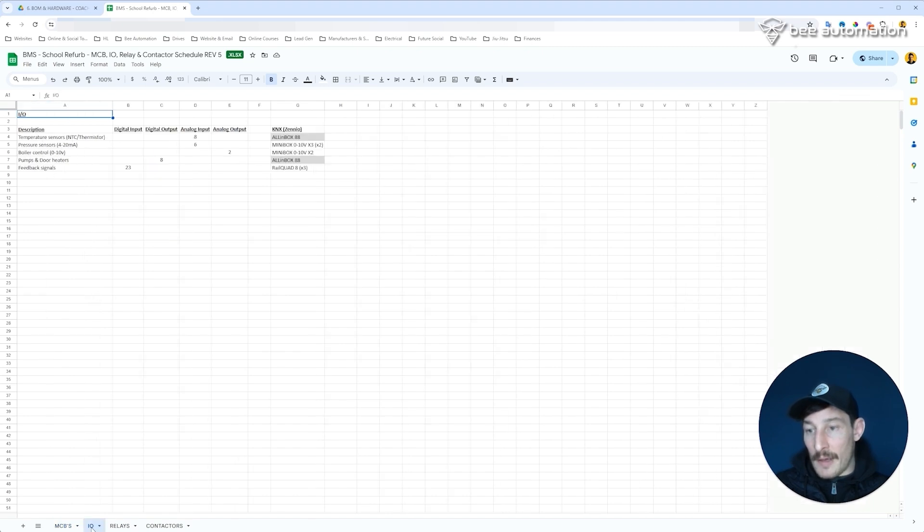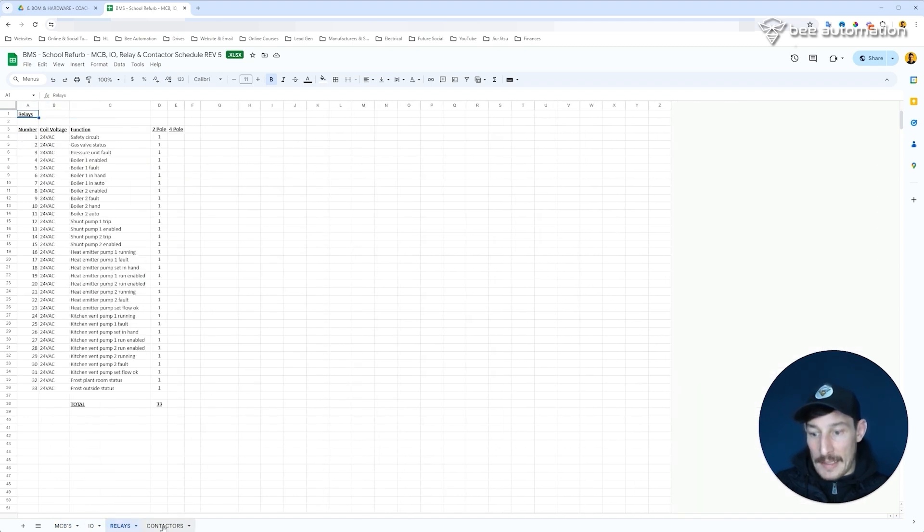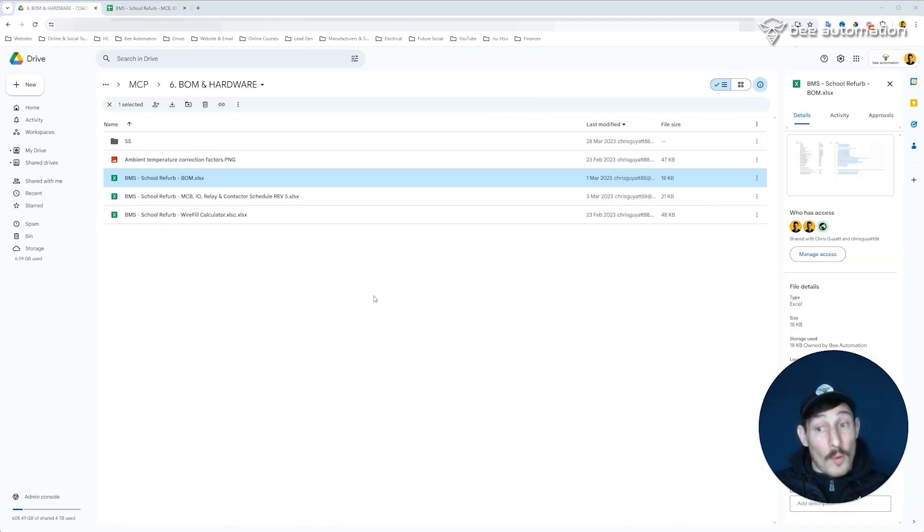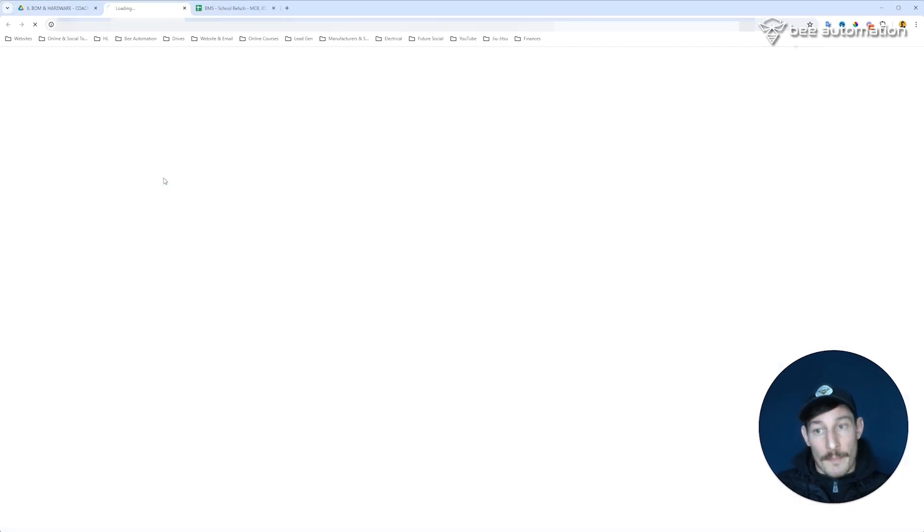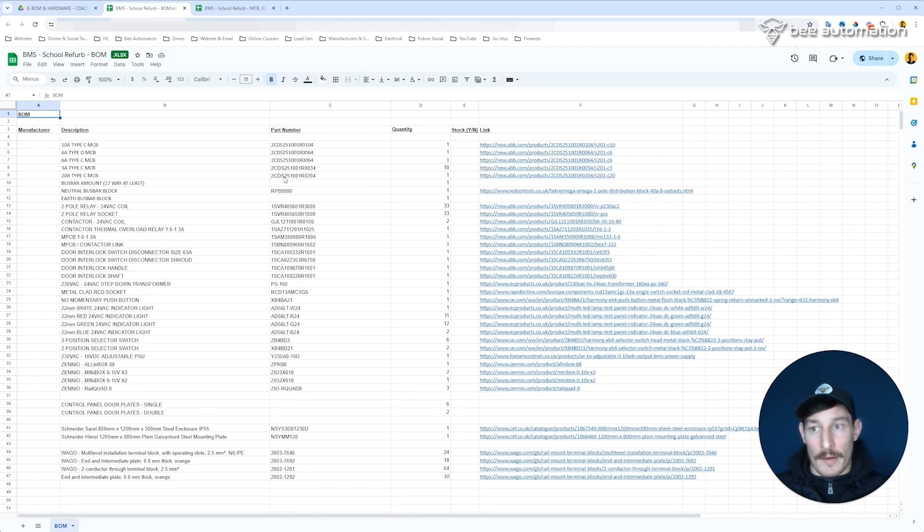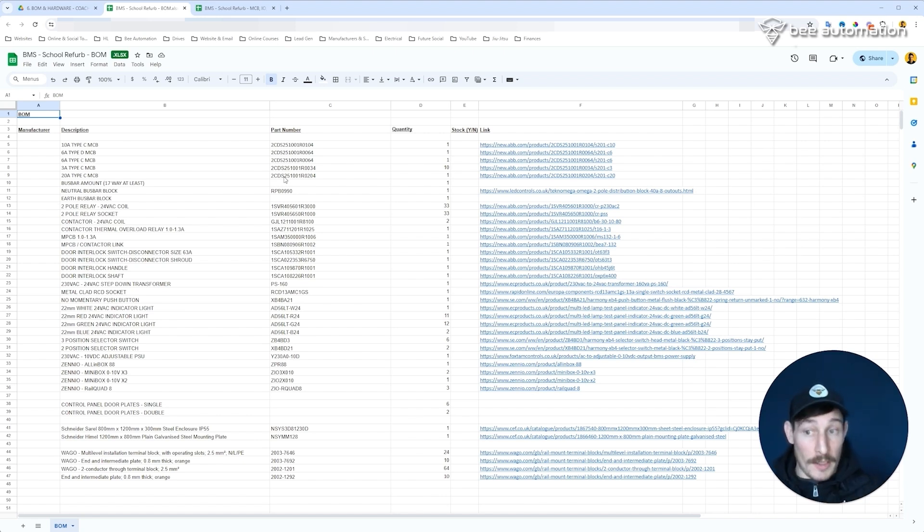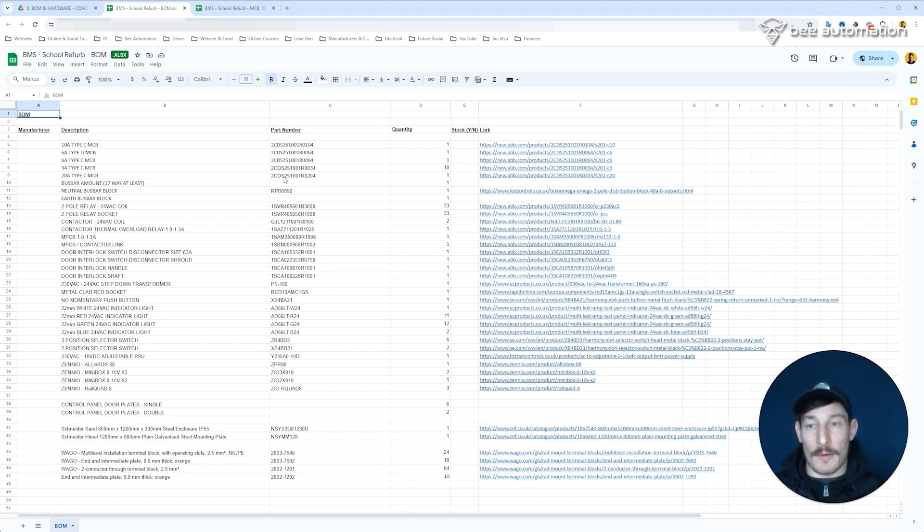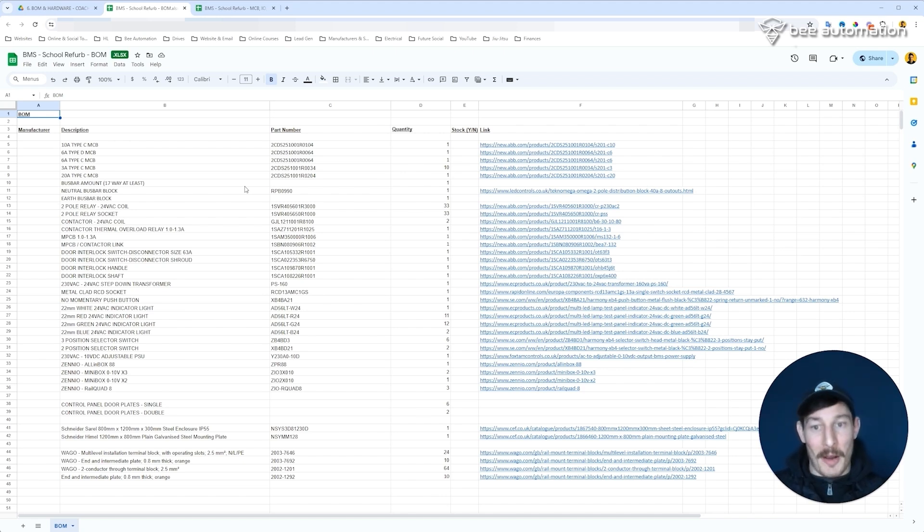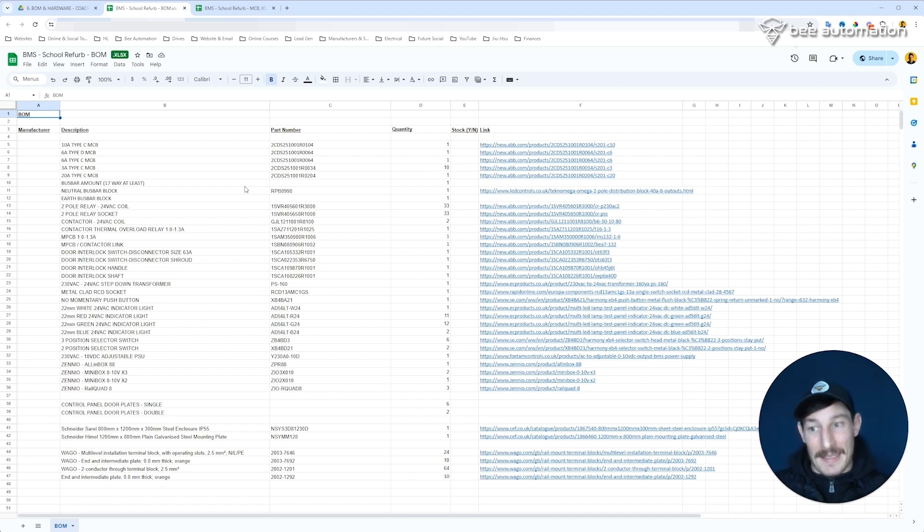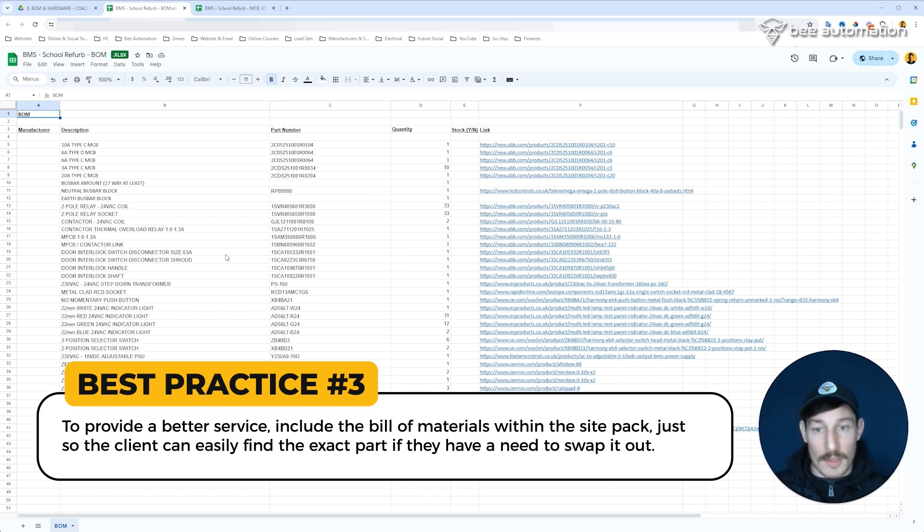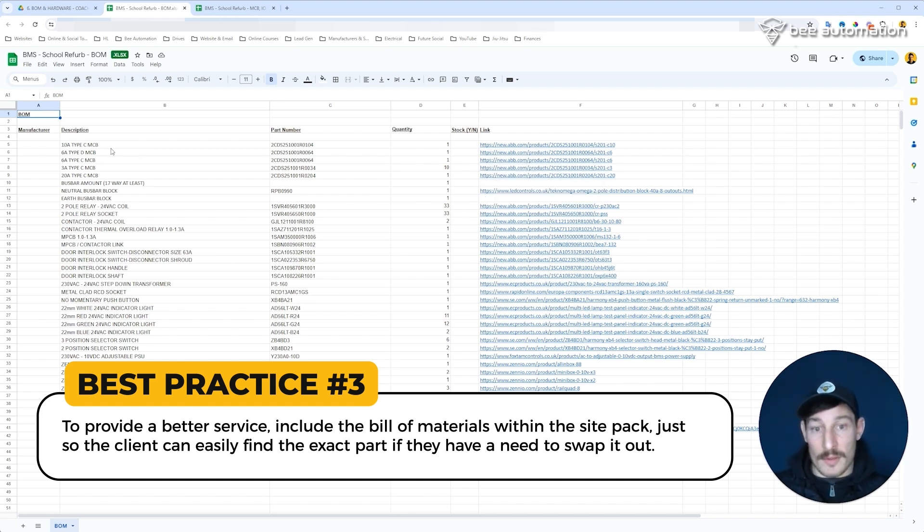I might also choose to include the bill of materials. Depending on how you want to run and set up your business, if you want the client to always come to you for any parts or hardware - if things break or need maintaining or servicing and they need new parts - then perhaps you don't want to share this bill of materials with them. It's not to say that they couldn't go see the part in the panel, for example, and go and find that online. It's probably a better idea just to provide a better service to include the bill of materials within the site pack, just so they can easily find the exact part if they ever need to swap it out.